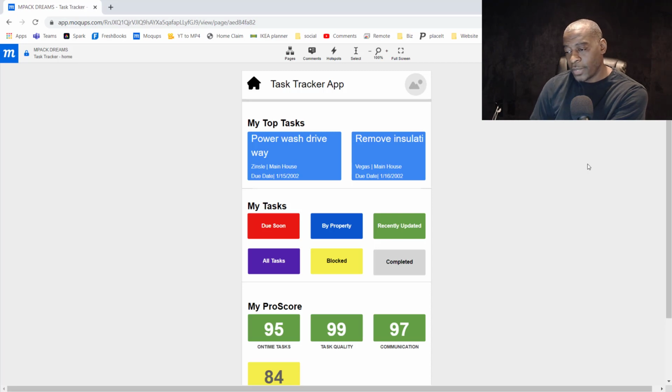One, they do not pay or track these tasks or pay someone by the hour. I know I just mentioned hourly folks, but even if you're on the team and you're getting paid on a consistent basis, they really want this to be driven by the task. So they itemize each task and they put a number against what the pay is for that task.